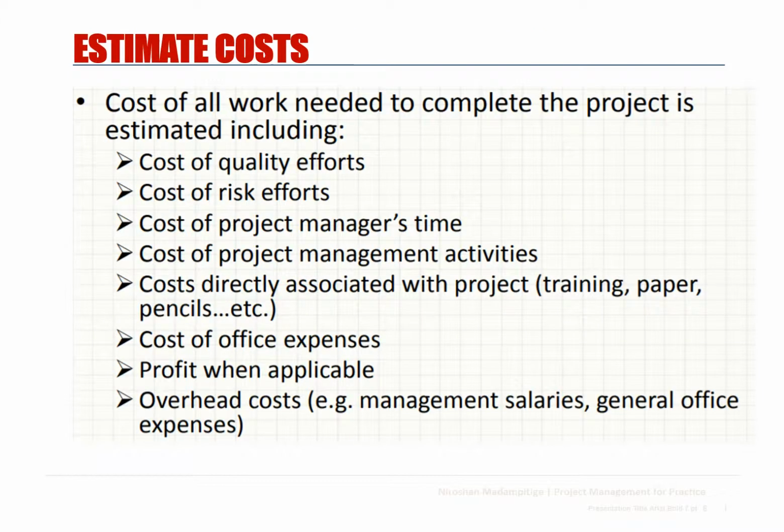Cost of all work needed to complete the project is estimated, including the cost of quality efforts. Depending on the quality requirements of your project or product, there will be a cost of quality associated with the quality of the product and the project. Cost of risk efforts, depending on the remaining risks after you have completed your risk management activities.